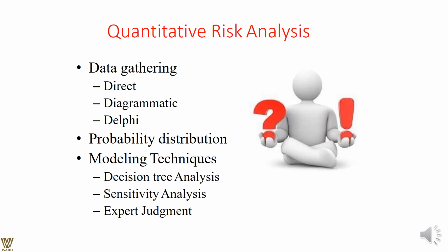Then we come to the quantitative risk analysis. This is all about data gathering, be it direct, be it diagrammatic, or the Delphi method. The Delphi method is a method which works with specialists. The specialists are experts in the field of the desired project. You can always consult the expert, have their viewpoint, and incorporate it. You can have counter questions and counter measures placed around it.